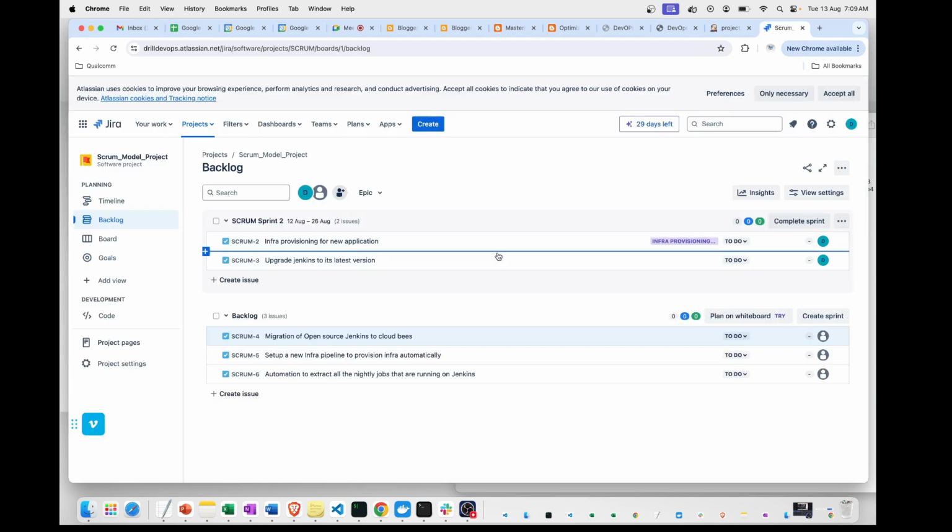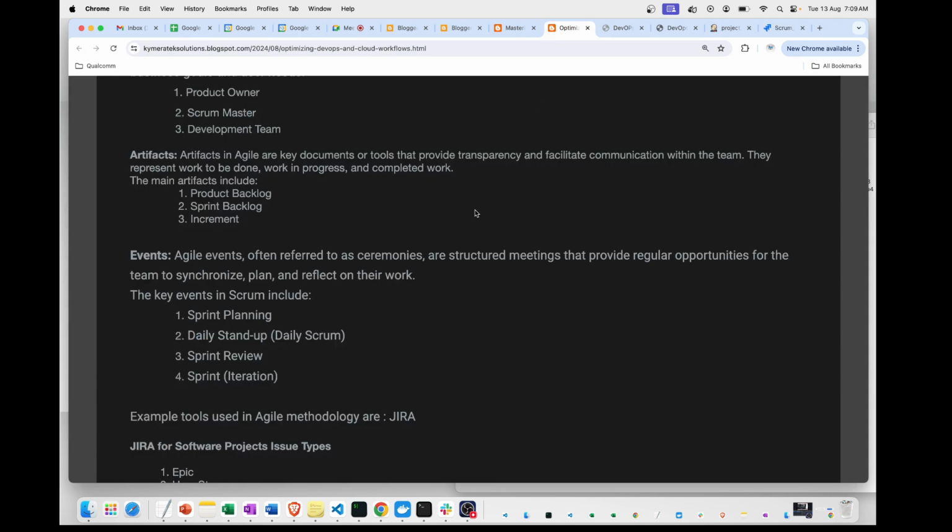Based on the team, the time duration changes. So this scrum planning or stand up call would be lasting from 15 minutes to 30 minutes sometimes. And we discuss blocker items during that time, what we have done from yesterday and what we are planning to do today.